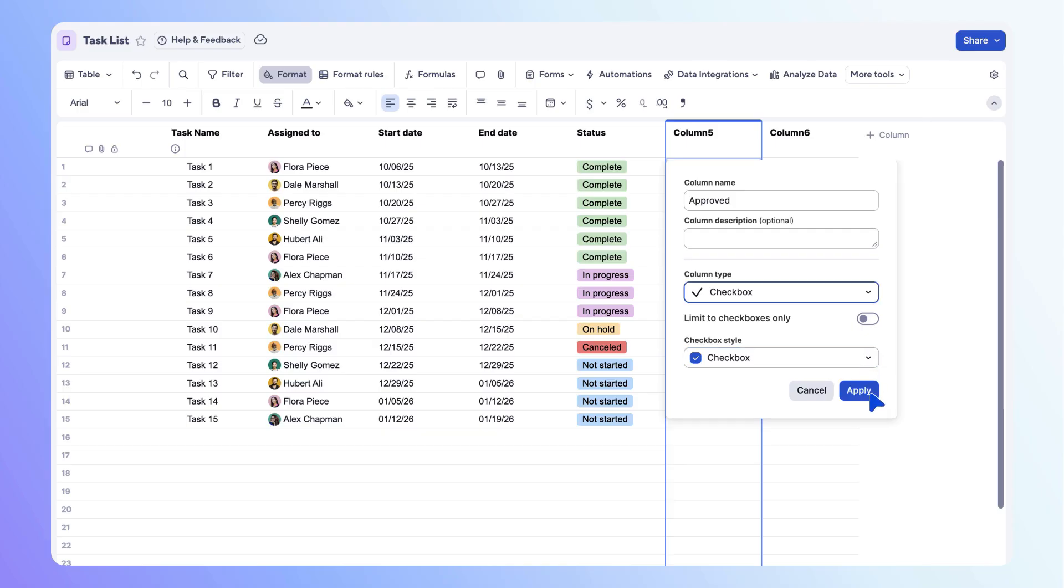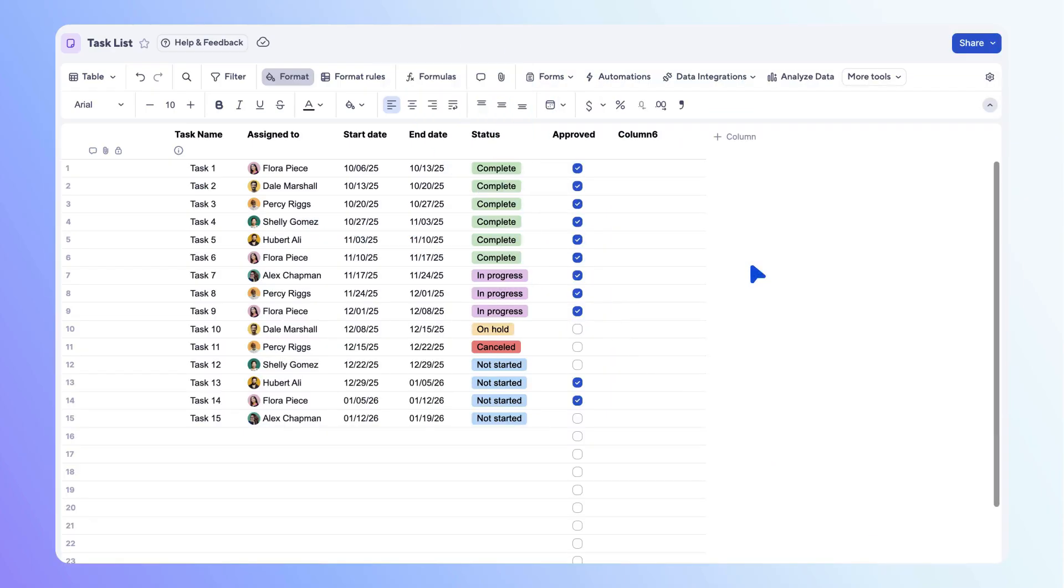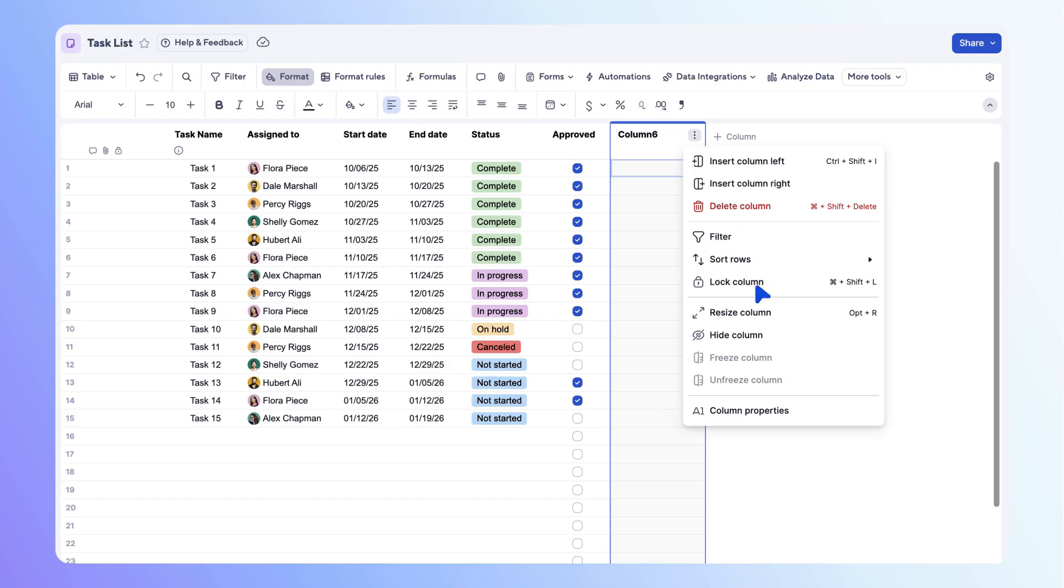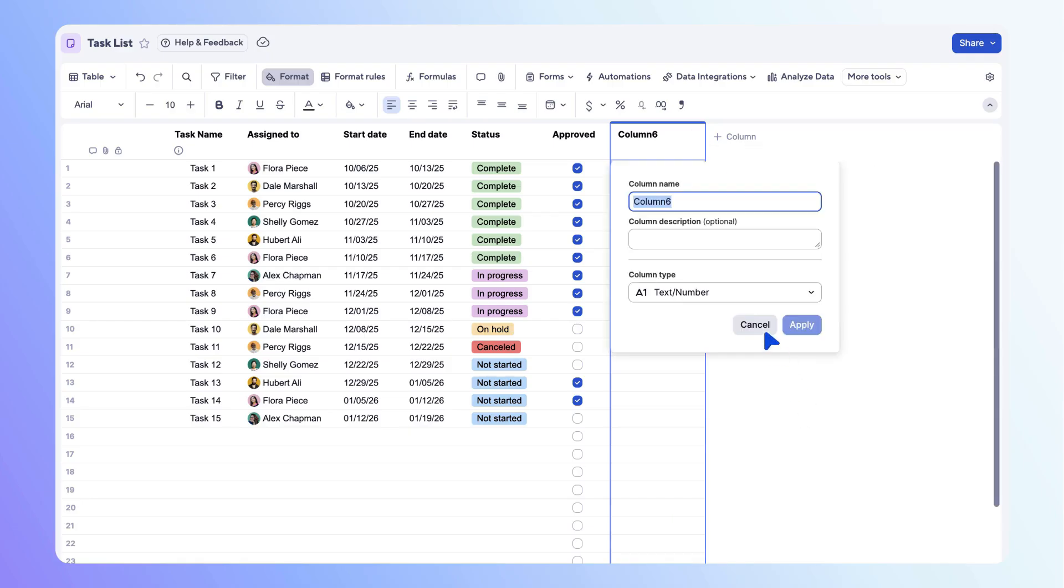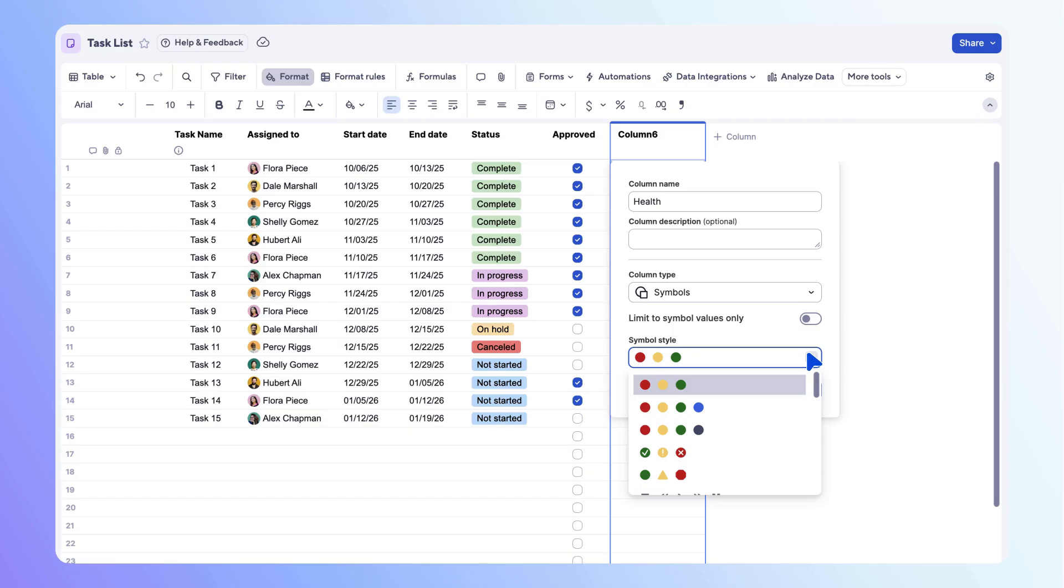Next, let's add a symbols column to track the health of each task. Name the column health and select symbols as the column type. Use the drop down menu to select the best set of symbols for your data. Select apply, then add a symbol for each row.